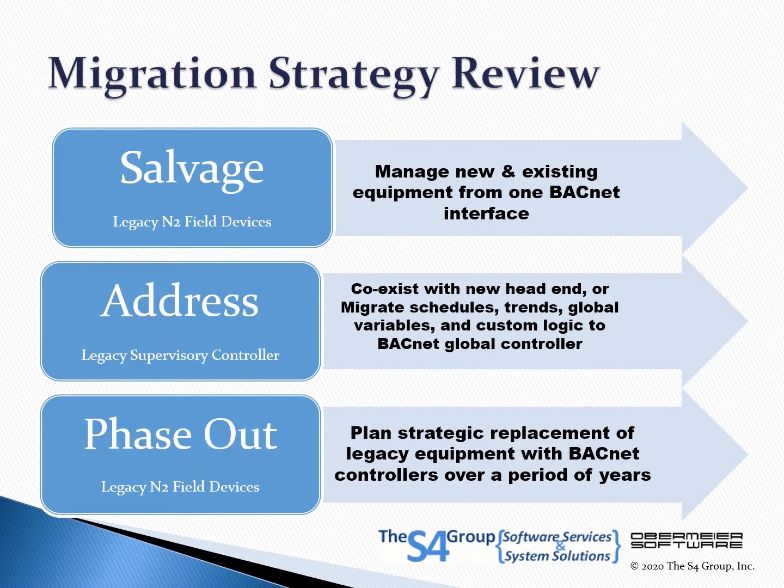In summary, the process is: discover and emulate the legacy Metasys N2 devices as BACnet devices. Add a new BACnet-based head-end or value-added services. Determine if coexistence with the legacy Metasys Supervisory Controller is needed or if it should be eliminated before doing the integration. Provide ongoing maintenance and support for the entire system while it is in operation. Eventually, phase out all legacy devices as the migration to an open BACnet installation is achieved.